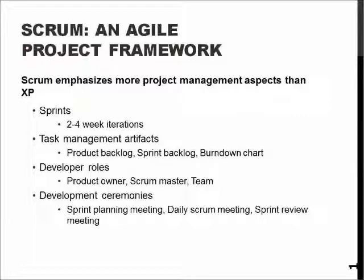Scrum is an Agile model. It has some peculiar terminology. For example, in Scrum instead of iterations we talk about sprints. Sprints are basically an iteration within a project lasting two to four weeks, and they are used to develop, test, and integrate a certain set of features into the product.